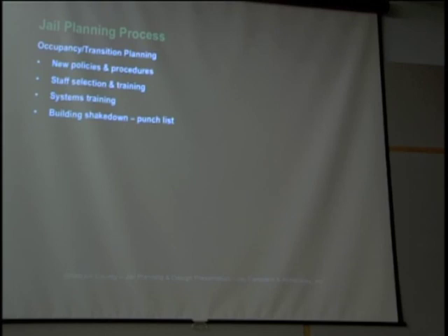But you've got to learn how to run them. You've got to shake everything down and make sure that everything works before you accept it from the contractor. There's a process called a punch list of the things that need to be taken care of before you actually take responsibility for the building. And all of these things take time.